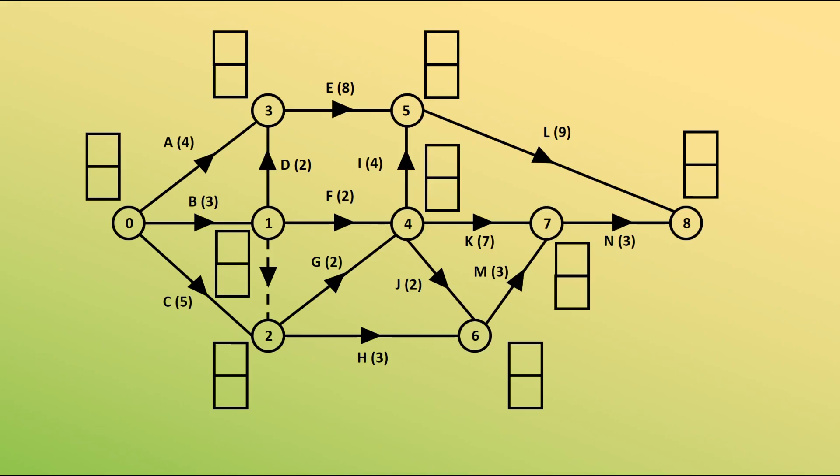Starting at node 0, the earliest time we can start our project we're going to say is at time 0. We then look at node 1. This is the only edge which is going into node 1. So obviously to be at that node we need all activities to be done that feed into it, and so the earliest time we can be at node 1 is time 3.